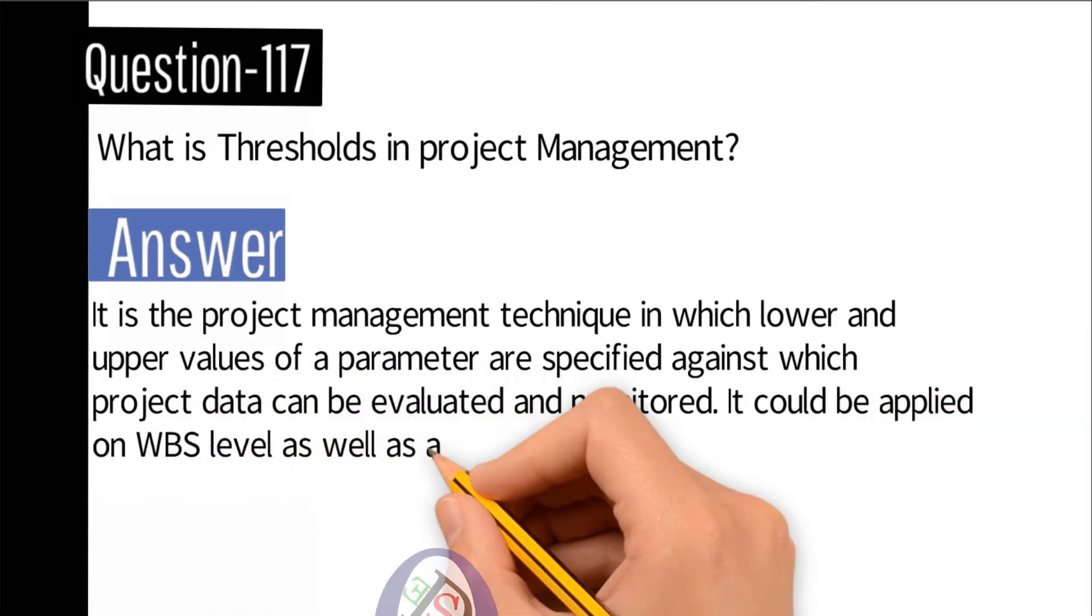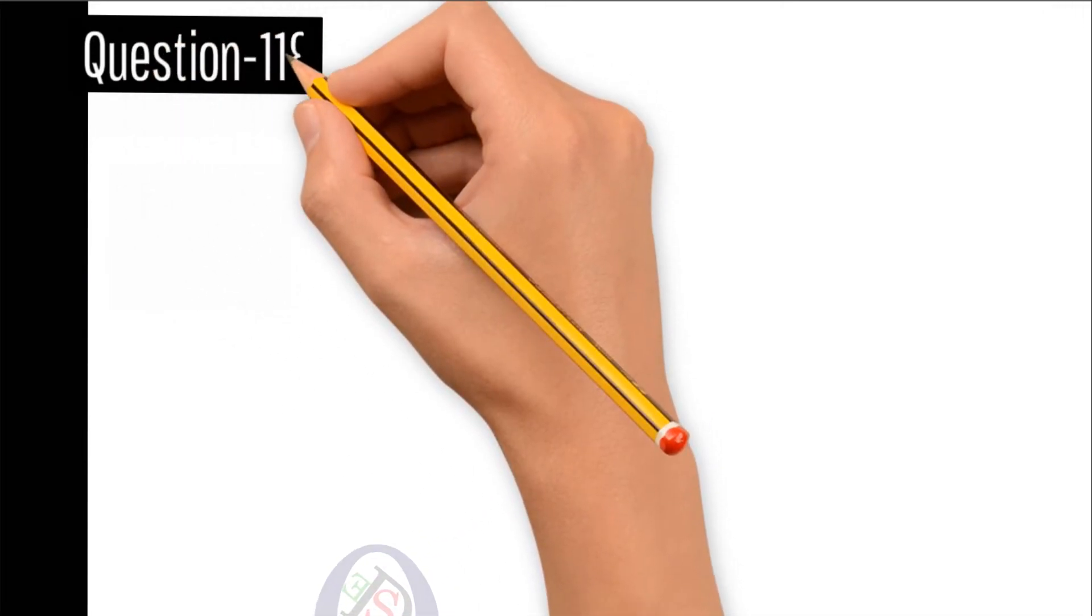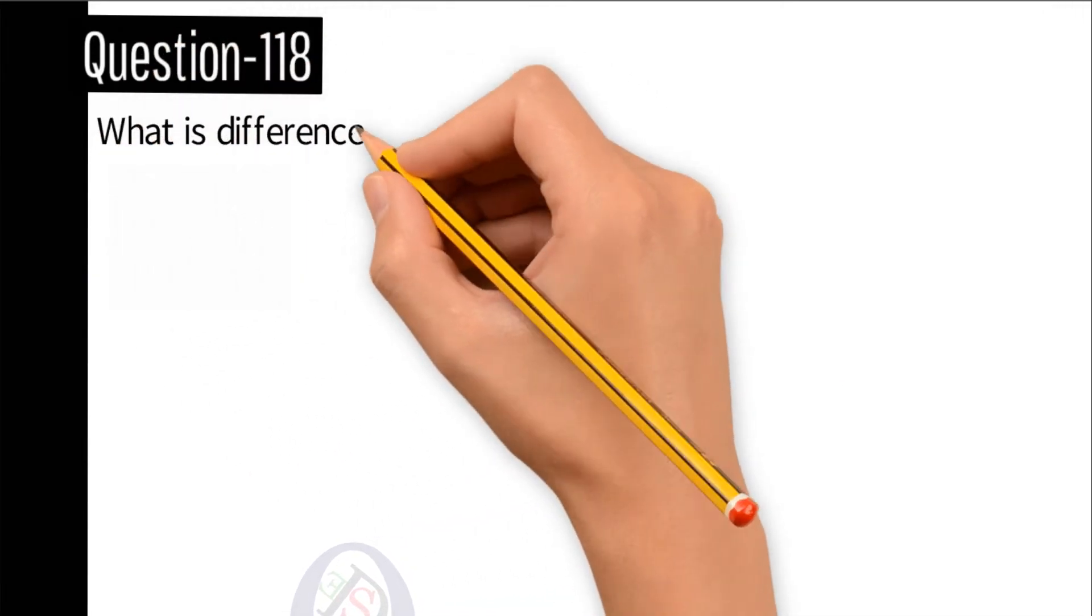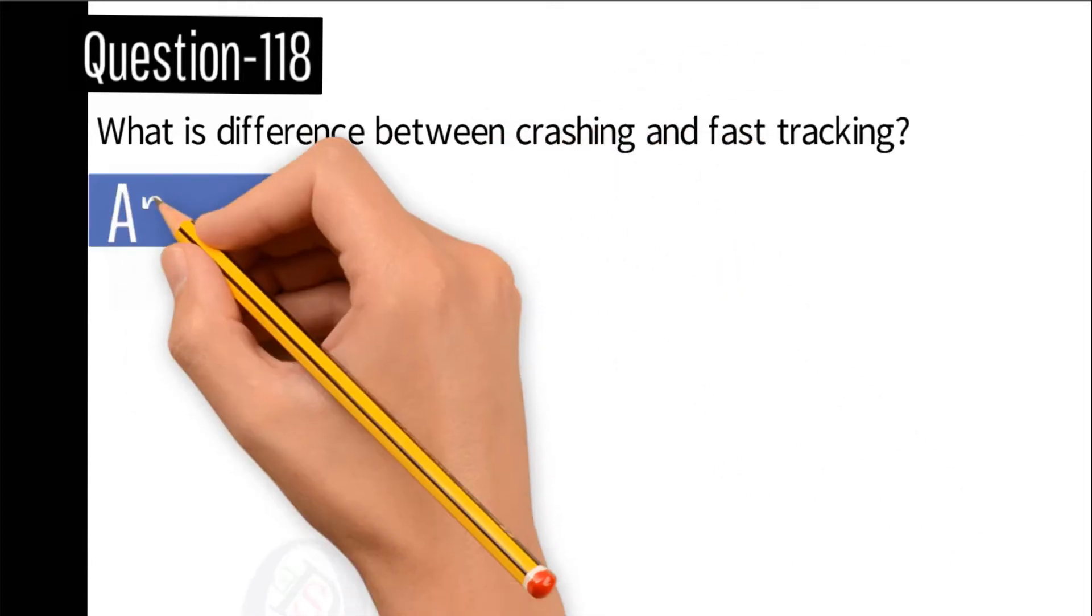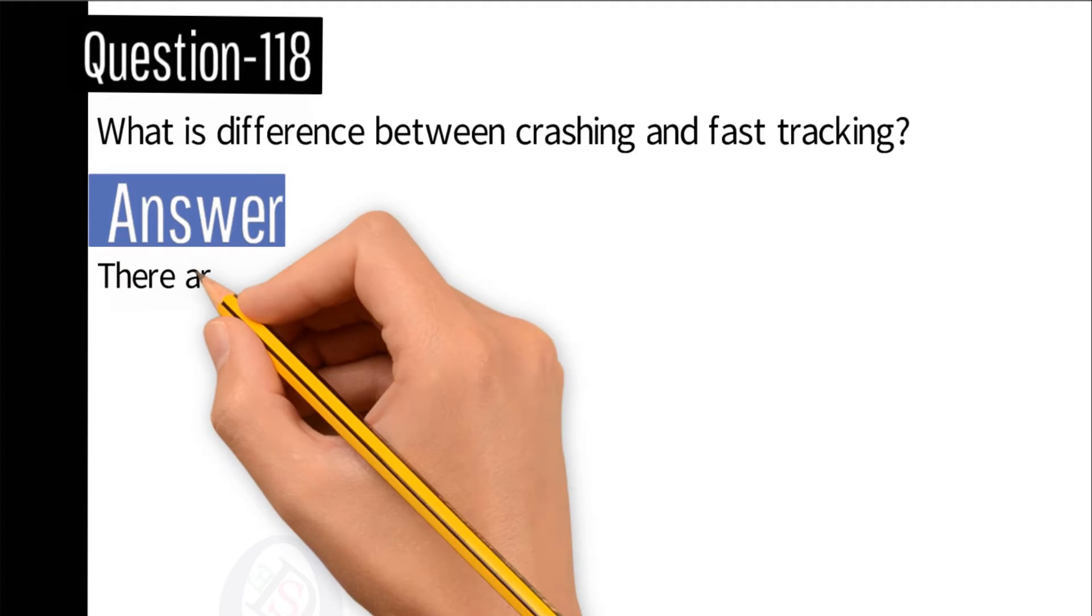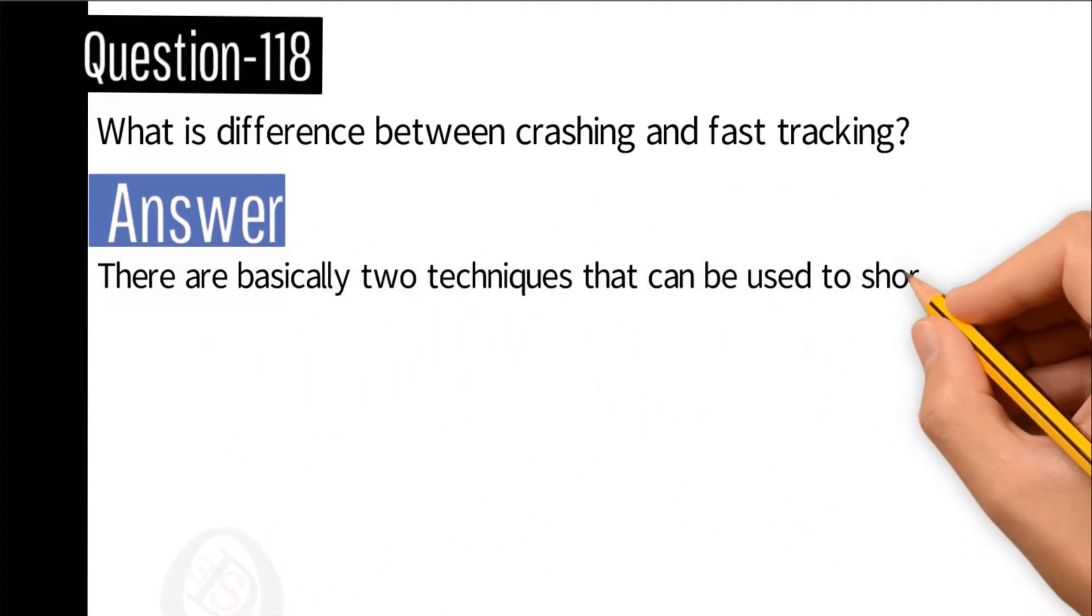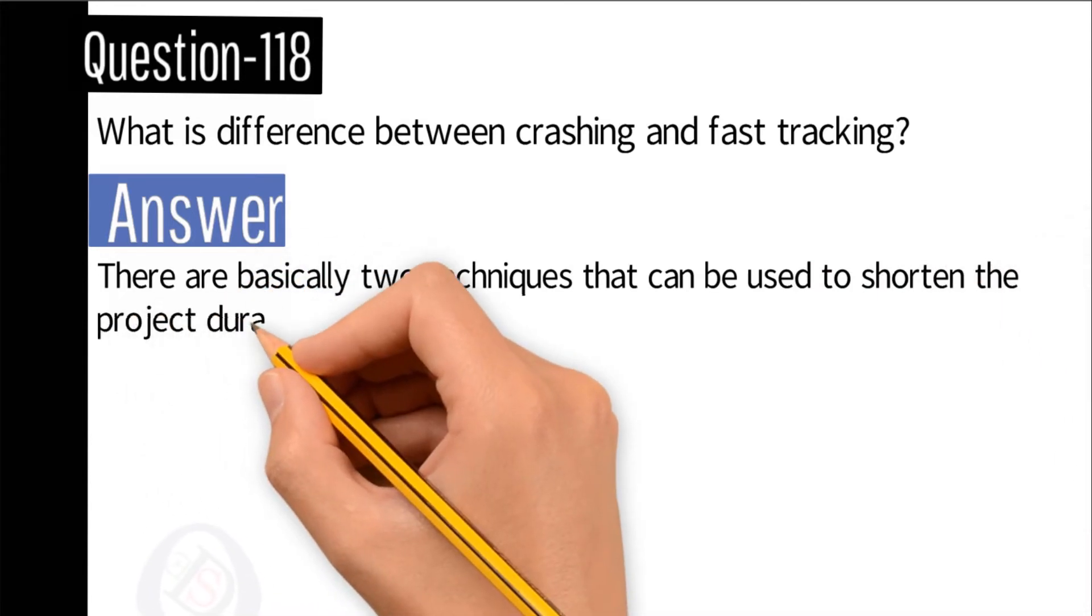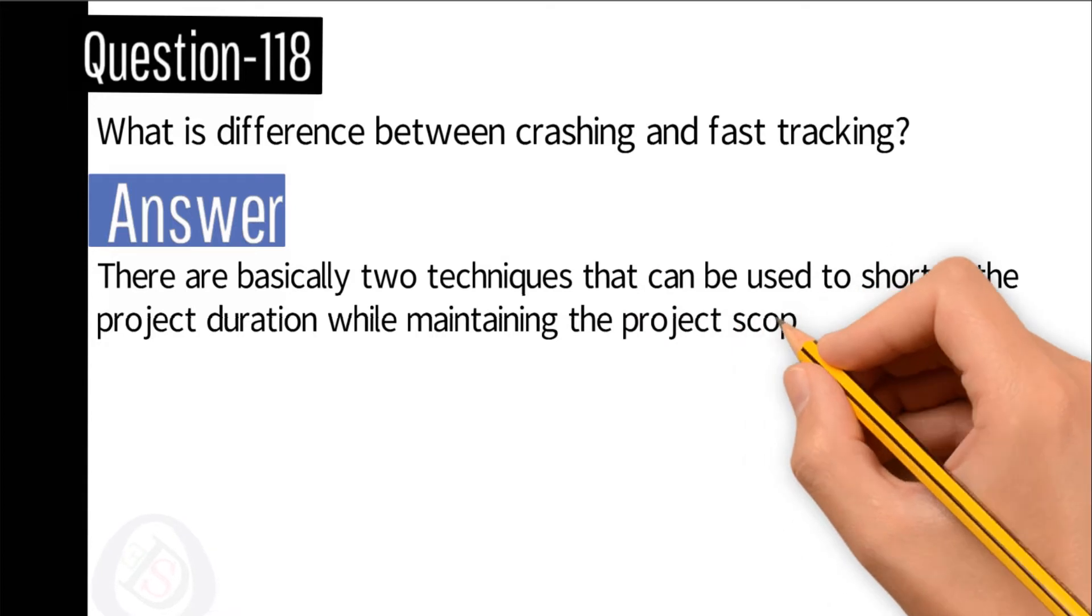Question number 118: What is difference between crashing and fast tracking? Answer: There are basically two techniques that can be used to shorten the project duration while maintaining the project scope. These techniques are fast tracking and crashing.